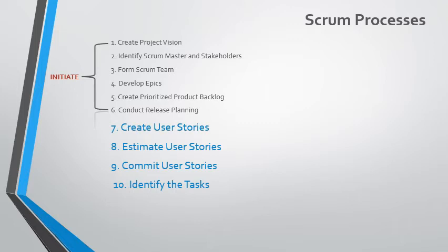This is what the team will do for the user stories to be completed. For example, creation of UI, back-end coding, and updating of the database are tasks of a user story. After the task identification would be the estimation of tasks. But usually this is skipped if the team is just using story points for monitoring, so estimation of tasks by hours will not be relevant anymore. Usually this is not done by the team.